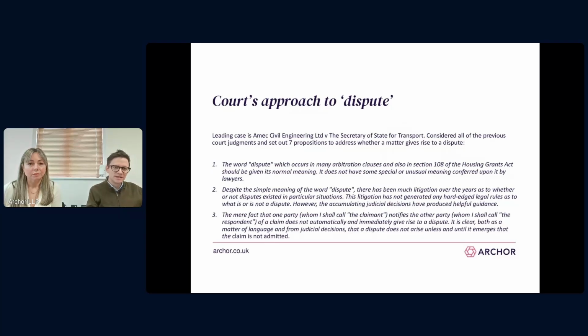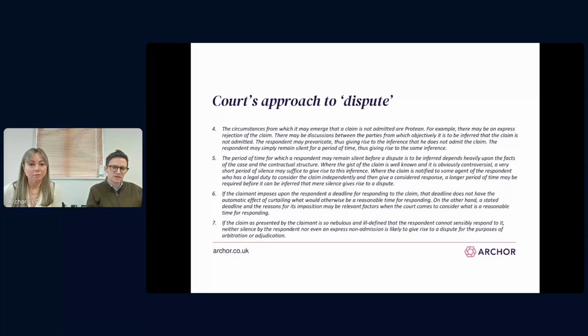It's slightly different in the notified sum or smash and grab context, in that if you're the payee, once you make an application, if there are no notices in response, once the final date for payment has passed, a dispute's crystallised. You don't, as the payee or the referring party there, you don't need to do anything extra, i.e. write to the other side and say, final date for payment's passed, pay up in 7 days, or I'm referring a dispute to adjudication. The very fact that the final date for payment has passed and nothing has happened, you've not been paid, no notices, you've got a crystallised dispute. And that's the second lot of principles from AMEC.